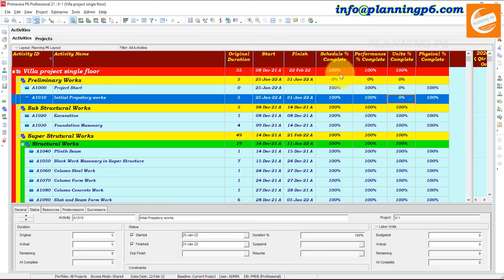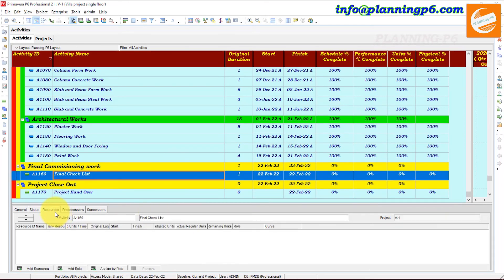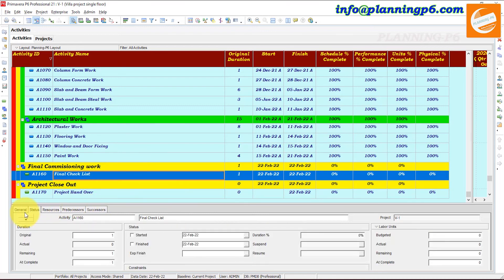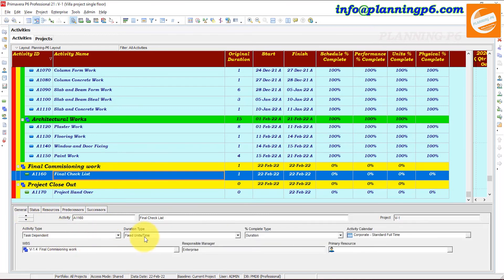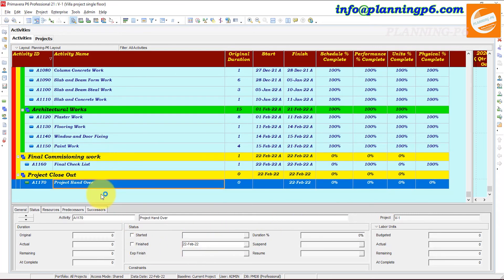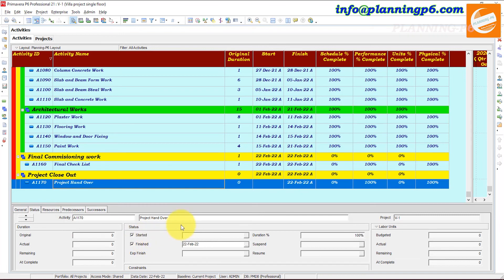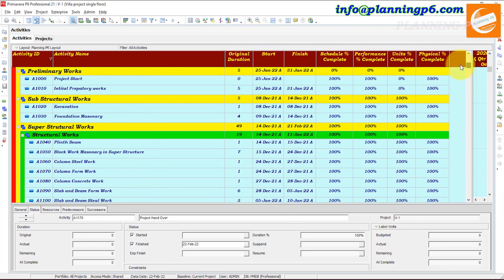Now you can see Schedule Percent Complete is 100%, Performance is 100%, and Unit Percent Complete is 100%. All activities have been updated. However, these two activities are still remaining: one has no resources and must be updated manually, and the other is a Finish Milestone with activity type Task Dependent and Fixed Duration — we also have to update this finish milestone manually.